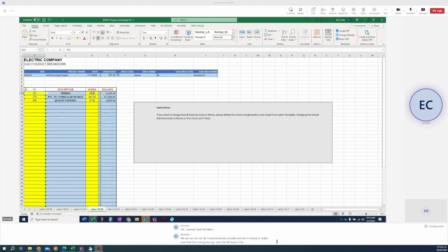If he does, we'll see the overage that he went over on that task, or under. It might only take him 32 hours. On the other hand, it might take him 120, because we're pulling this off the estimate, and as far as labor goes, it's an educated guess more or less. So the main thing comes in when you start to really have the hours.